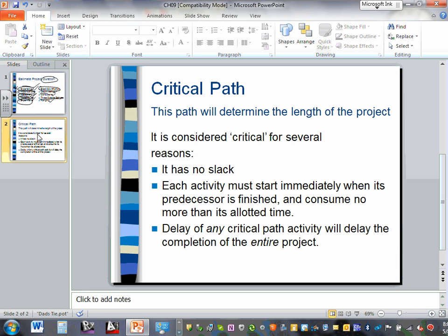have their own project manager. They're looking at you as one critical path. So they put all our analysis in the big picture, all that 10%. That's where electrical is going to fit. And then they look at it. Is the electrical going to hold us from finishing this stadium in 2 years? They analyze the electrical path and all the mechanical path and the structural and everything else. And they said, you know what? The one that's going to force us to go 52 weeks instead of 42 weeks is the electrical.